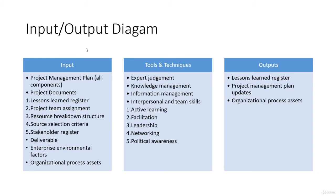Political awareness is very important. As soon as you are dealing with humans, you are dealing with politics. You need to know what kind of information is important for the project and what is not. Sometimes you may get information that looks trivial but ends up affecting your entire project. For example, if senior management wasn't favoring a project — you got the go-ahead initially but later something changed and the project was disapproved — all your efforts could be wasted. That's why it's important to keep an eye on the political surroundings.